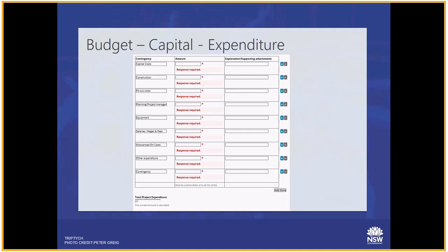Another mandatory inclusion in the project budget is project management associated costs. All projects must have a nominated manager who is assigned responsibility to ensure the project's outcomes are achieved. The cost of the project manager's time must be shown in the budget. Where the project manager is working on a pro bono basis, in-kind contribution, then record this in the description and show the cost as zero. Also, please note that at least one quote must be provided for all major cost items. All quotes must contain the supplier's business details, including address.